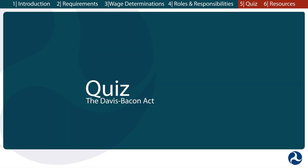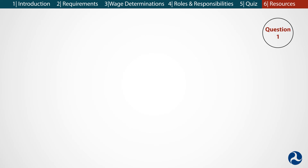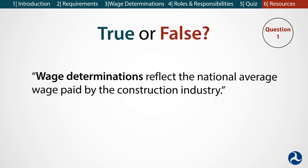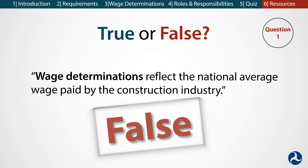That was a lot of information. Let's take a moment to review some of it by going through a quick quiz. Question 1. True or false? Wage determinations reflect the national average wage paid by the construction industry. False. Wage determinations reflect the prevailing wages and benefits paid by the construction industry in a specific locality for a specific skill set, so the wage determination is likely different in different parts of the country.